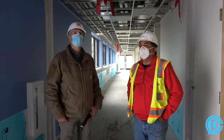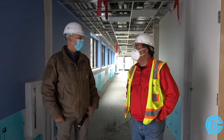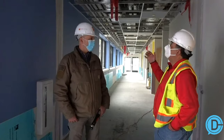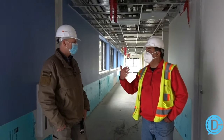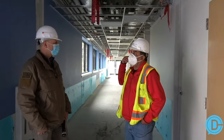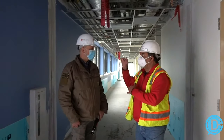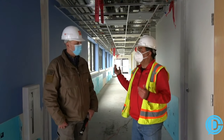Yeah. There is a pretty nice BMS system that we're putting in. That all has to be wired here, so that'll take some time. The VAVs are all in already. Those we actually had the mechanical contractor ship down to MODLOGIQ, so that's why they're all in already, so that will save a lot of time. And again, their subcontractor and ours worked together with Johnson Controls to make sure that they were already all set to go. Yep. So now the wiring just has to come to them.